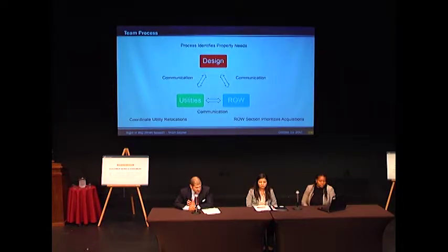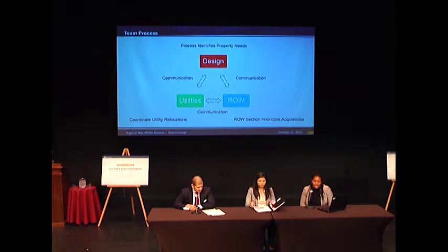Throughout that process, there's a great deal of communication involved. Communication is important throughout the entire process, but most importantly in the beginning. Things that we need to discuss include proposed letting date, who's going to be responsible for contracting for right-of-way surveys, if it's going to be through the PS&E contract, if it's going to be our district survey, or even right-of-way, if right-of-way is going to handle that.